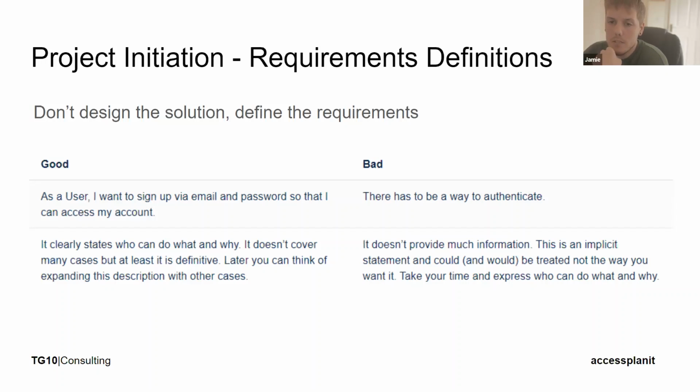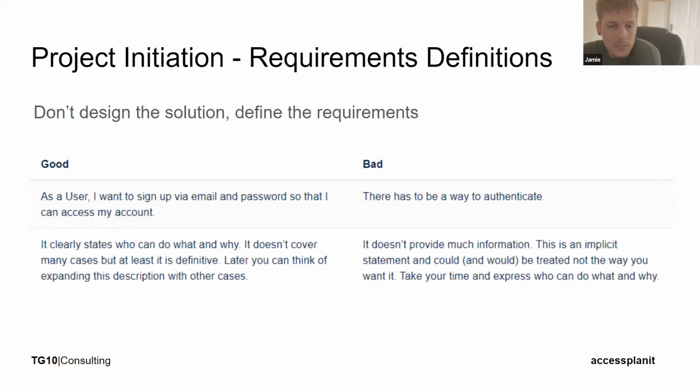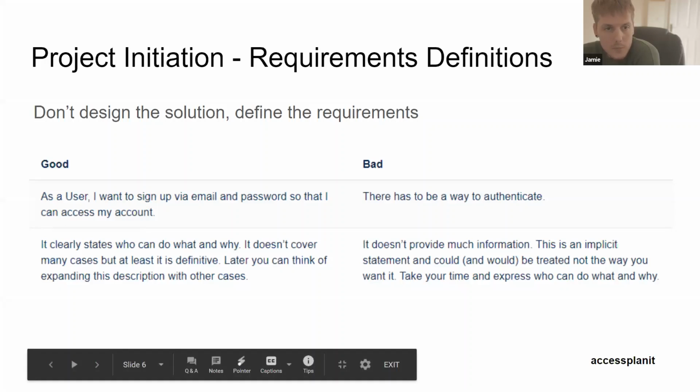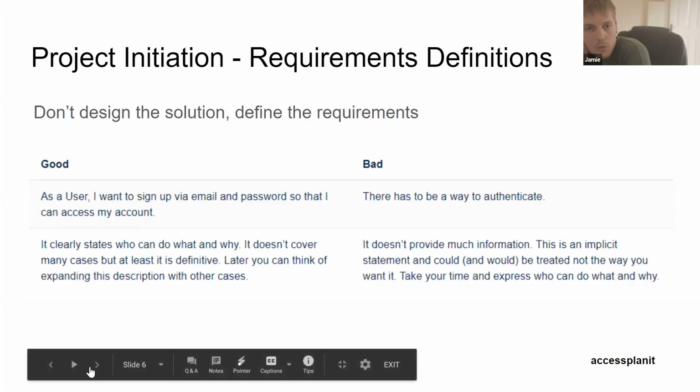So yeah, I think it's really important to, like we mentioned here, not design the solution; we're just defining the requirements in here. And prioritizing these as well is really important. The reason being, we were talking about value before, everything's about delivering value. So we can prioritize our requirements and meet those, the sooner we can start seeing that return on investment. There may be small changes that we can make to have big benefits, but it's all defined in here, I feel.